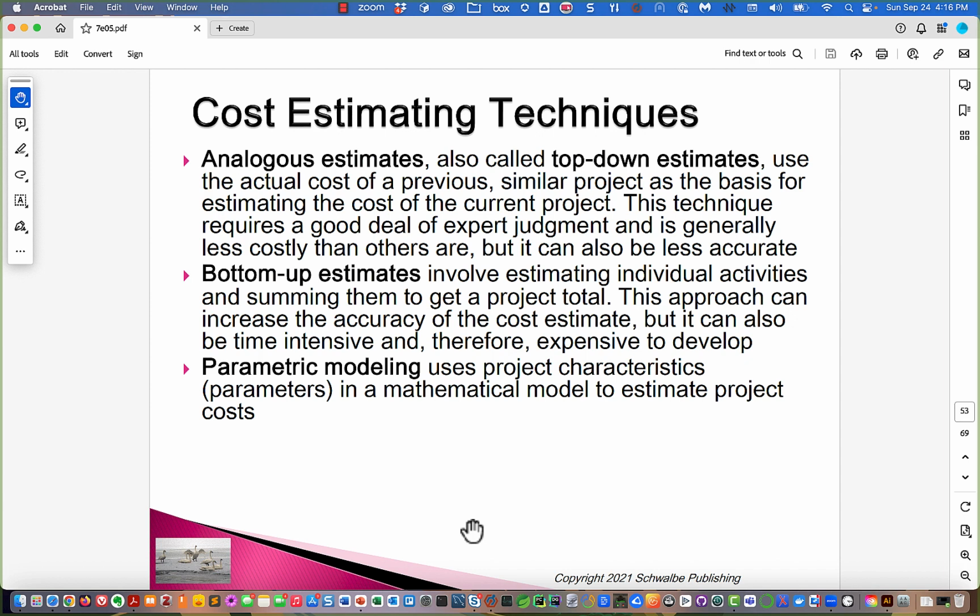In some organizations, you're just charged for what you use, and what goes underutilized is somebody else's problem. But in a lot of organizations, you get the resources that you got, and they're yours until you give them back, and they charge you every month or every week until you give them back. And so the real cost isn't the sum of the cost of all the activities, but the sum of having the resources over the life of the project in order to get the activities done. And this was where bottom up estimates can underestimate the cost.